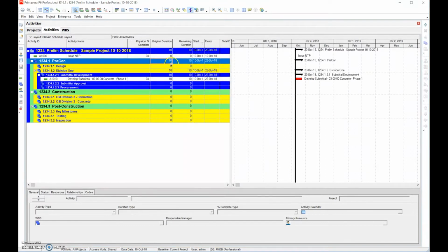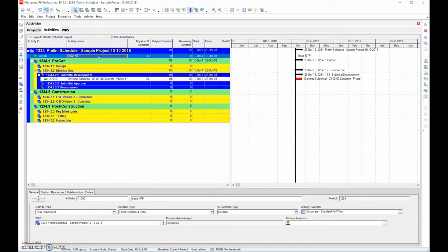I like to do a schedule methodically, and what I mean by that is, during this step I like to go through all the tasks and assign duration days at once. So during step 5, when we're defining activities, we define them all, and then we come back and put all the duration days for all those. The reason I like that is because it makes your thought process consistent. Most people will try to do everything, put in the predecessor, successor, everything in that individual step. But the problem with that is you lose the consistency of thought.